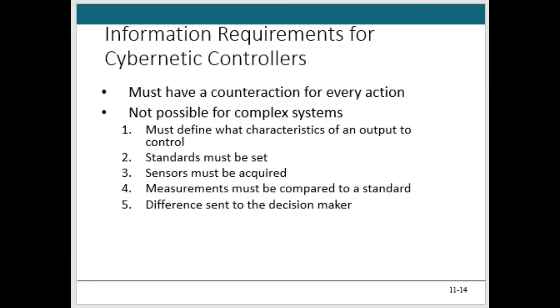For example, the cost and schedule variances, SPI and CPI, that we've already talked about earlier, can be entered as standards, and specific deviations from the cost performance index or schedule performance index can be used to trigger your project manager's review and correction as necessary.